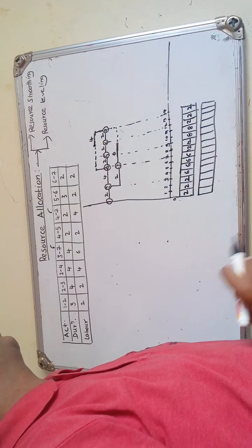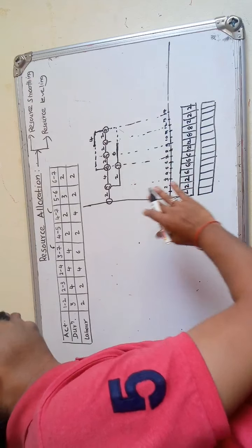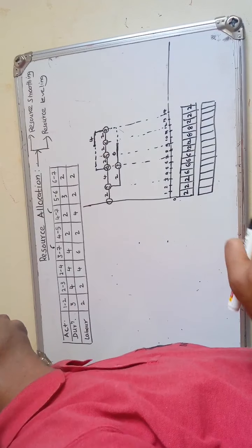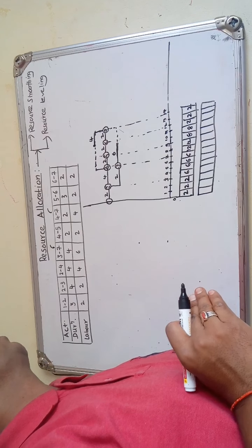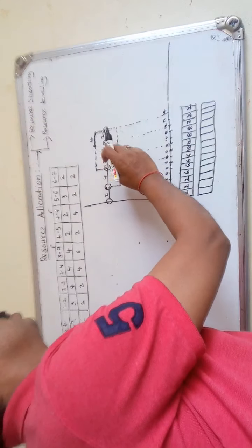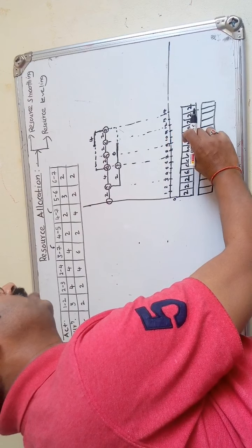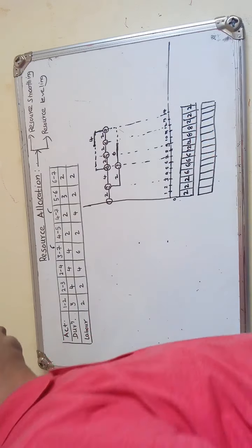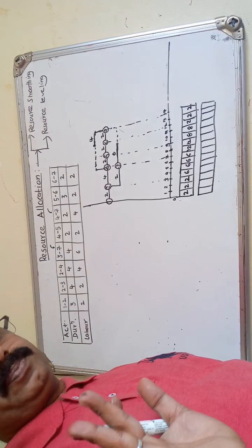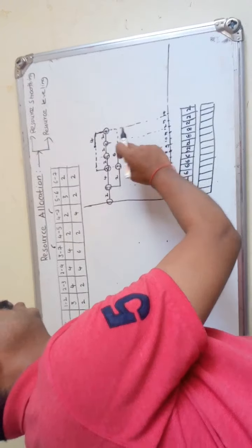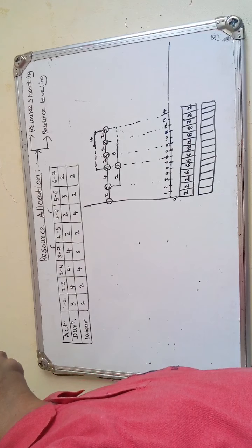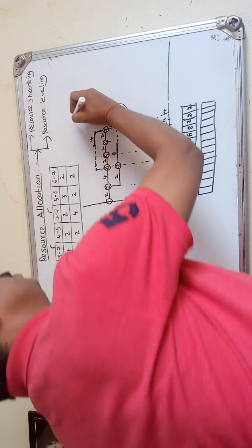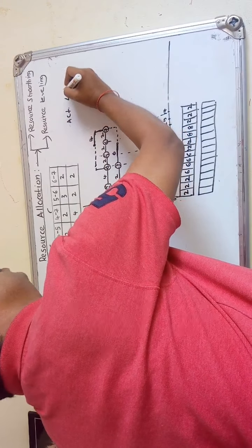So if you see, only one activity, the 4 to 7 start time, we will shift here, and by that we can reduce the manpower or labor requirement on these 2 days from 12 to 8. Only one activity we have shifted. If we shift this 3 to 7, the manpower demand will increase. So I think you understood. Now only activity 4 to 7 is shifted here.